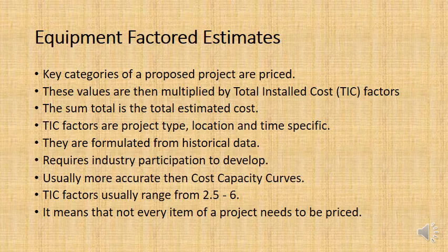Usually you need quite a lot of historical data to develop these total installed cost factors, so you need to look at a lot of different projects. So you need industry to participate. You need different engineers and companies that often compete against one another to work together to develop total installed cost factors, which they can then use. This is why it's actually often something that is done by universities as research.